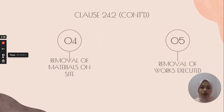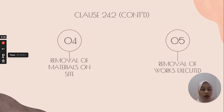Number four is the removal of materials on sites. The materials removed must be from the work intended originally. For example, the contractor bought ceramic tiles to be used as floor finishes as stated in the contract, but then the SO gives instruction to use pocket instead. Therefore, the cost for removal of ceramic tiles bought onto the site can be claimed under variation of works. Number five is the removal of works executed. Works to be removed must have been done according to the contract originally. The cost required to remove the works executed can be claimed.